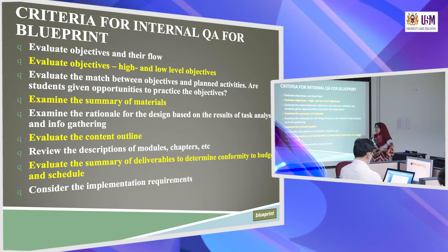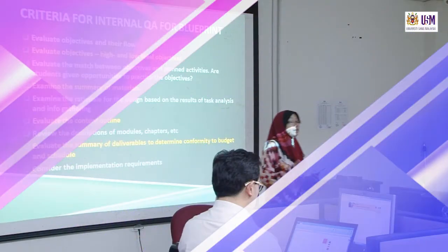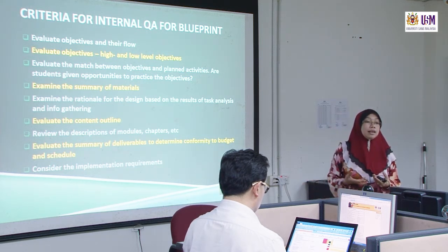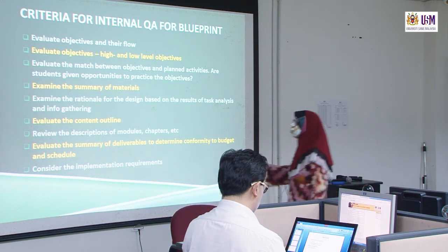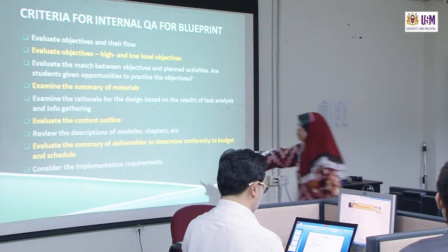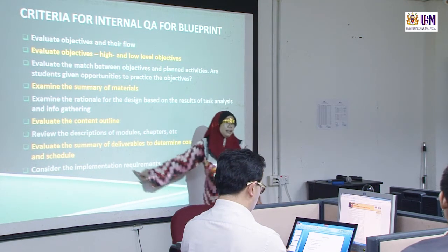And then evaluate the summary of deliverables to determine conformity to budget and schedule, and then consider the implementation requirement. At the moment, we only look at what we have to do, the immediate task, but we haven't considered the implementation requirement. For example, during the seminar, who is going to be in charge of the equipment? What if the equipment is not working during the seminar? Who is going to go to PTPM, for example, to get the technician? Are we going to request a technician and so on? So the implementation requirement is not discussed yet for your seminar.